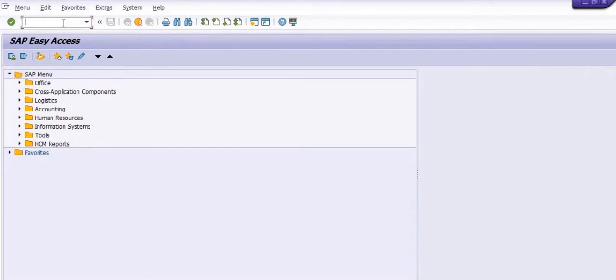mobile project, then your project will start from CEM. If you are going to create your civil project, your project will start from CV. If you are going to create external project, your project will start from EP. If you are going to create the transmission project, your project WBS starts from TP. If you are going to create CFA project, then your WBS will start from FA.